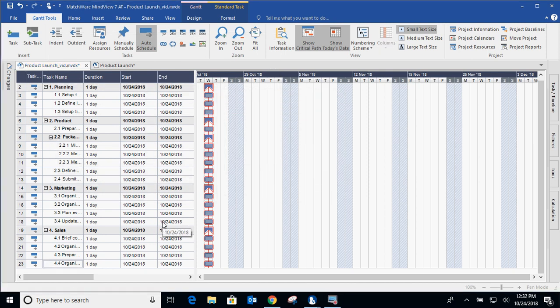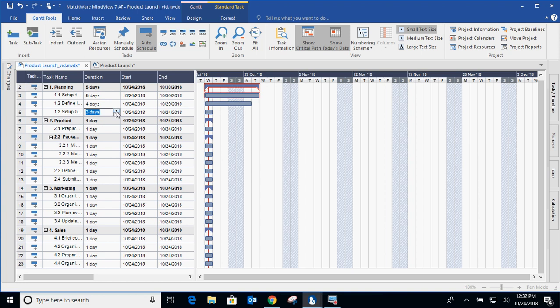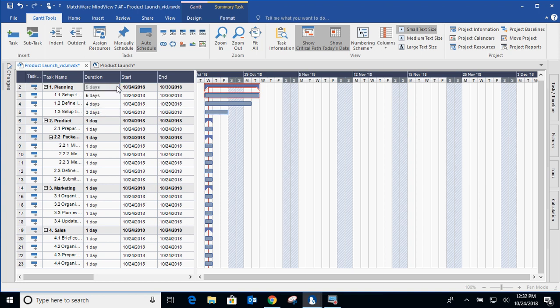So the way to work within a Gantt chart is start to estimate the duration of these items. For instance, I can estimate that's going to take five days. This is going to take four days. Maybe this is going to take three days. Now you'll notice some of these are darker and that's because they're summary tasks. Everything below the summary task is going to roll up. So you can't determine the duration of a summary task because it's determined by its children or its subtasks.